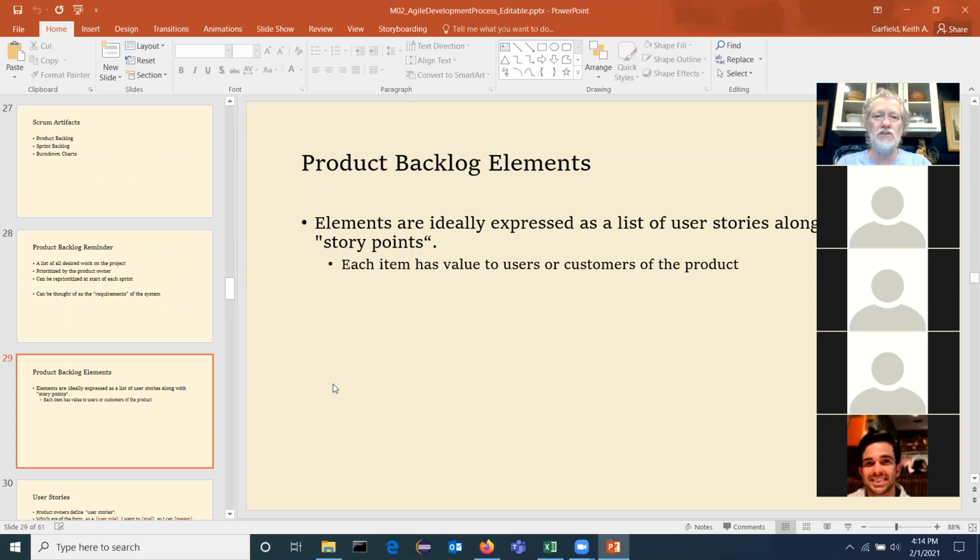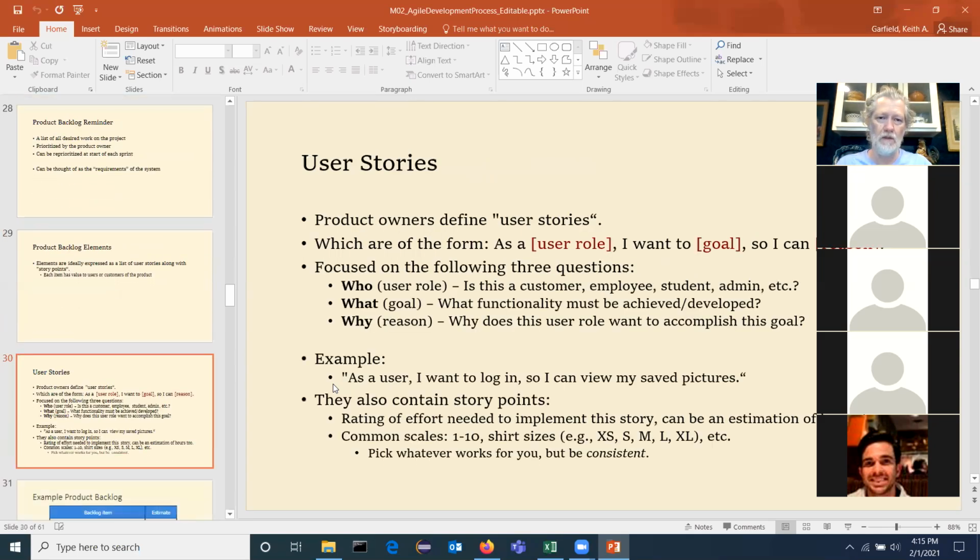And again, those of you that took CS225 with me, if you remember, last semester I really started that format. I had you do user stories before, but last semester I really had you lay out just a simple chart. Here are my user stories. Here's my effort that I think each one will take. Here's my priority. And I did that to give you experience for this class. Okay.